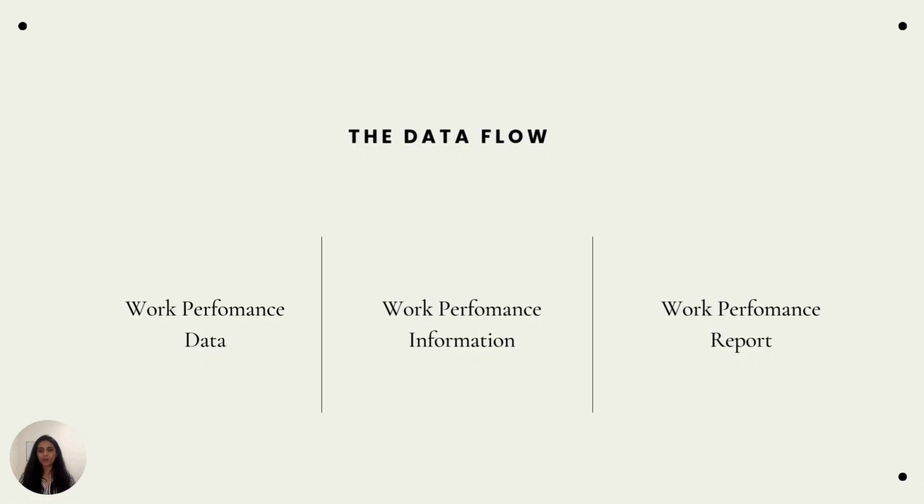Mastering communication is mastering your project. Calculate your channels using the formula n times n minus 1 divided by 2. Select the right method: interactive, pull, or push communication. And never forget the power of emotional intelligence and paralingual skills. We don't want to sound like Sheldon in the video.